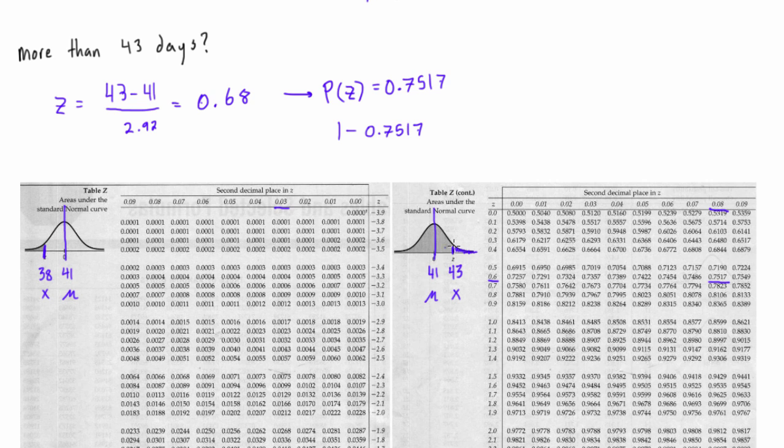Because if the shaded area is 75%, well we're looking for it's going to be about 25% or something. So if you just punch this in your calculator, 1 minus, this will give us the probability that we're not in the shaded region.